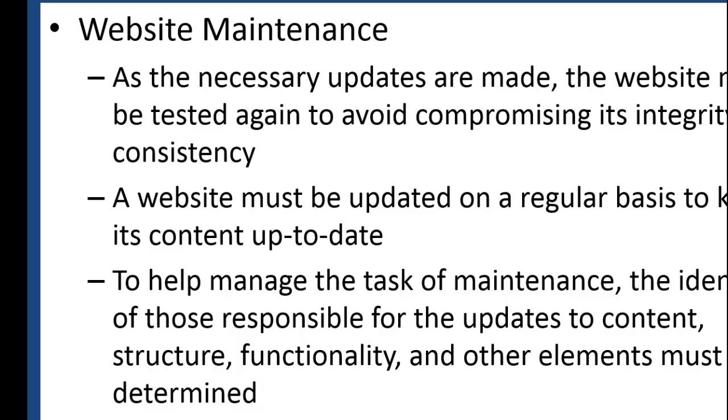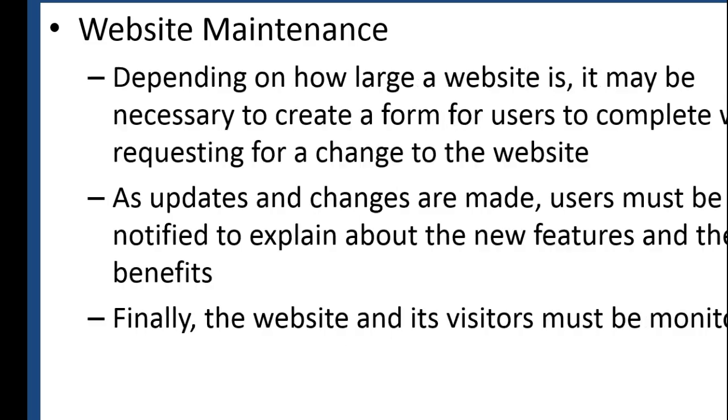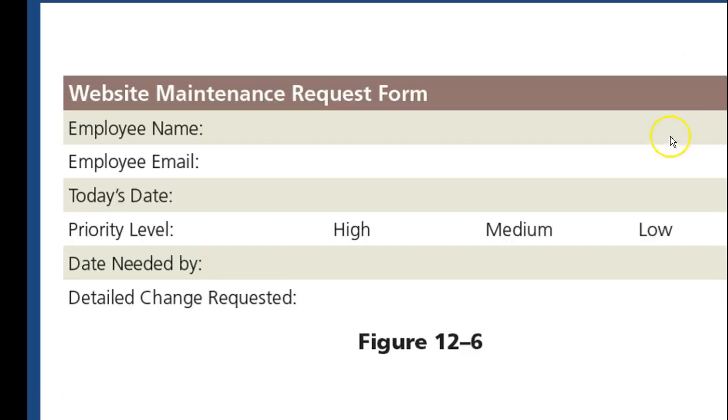To help manage the task of maintenance, the identity of those responsible for updating the content, structure, functionality, and other elements must be determined as well. So, depending on how big your website is, it might be necessary to create a form for users to complete when requesting a change to the website. So a change request form is sometimes very important in this phase.